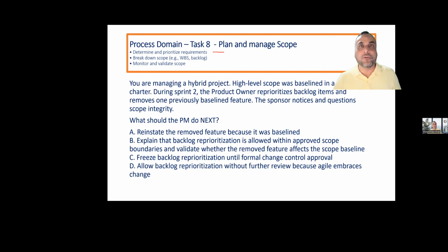And that should be prioritized by following the MoSCoW or Kano or 100-point or pairwise comparison methods, or based upon the customer prioritizations. Once we have the requirements traceability matrix available, we'll make the project scope statement, and then we will visualize the work with the help of the work breakdown structure and WBS dictionary, which will contain activities. Or we will have the updated or prioritized product backlog. The scope baseline contains the project scope statement, WBS and WBS dictionary, while the product backlog is also considered a scope baseline in an adaptive project.